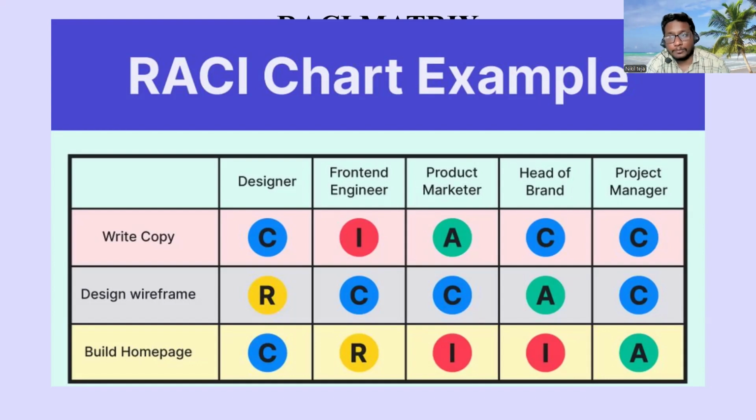Now design a wireframe. Wireframe is nothing but a black and white, low fidelity mock-up of how an app or a screen looks like. So the designer will be designing the wireframe, so he is responsible. Front end engineer should be consulted. Why?